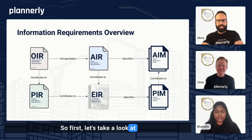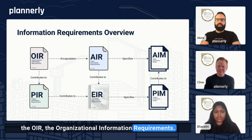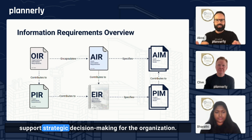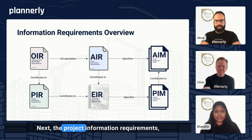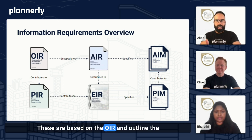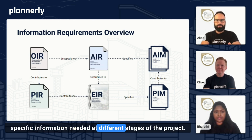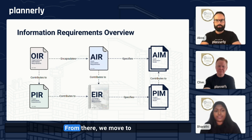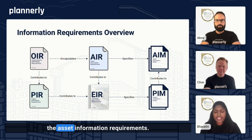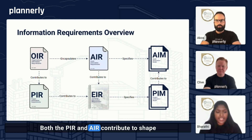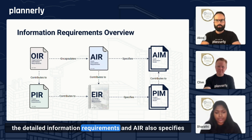Let's take a look at the OIR — the organizational information requirements. These are set by the appointing party and define the high-level information needed to support strategic decision making for the organization. Next, the project information requirements, or PIR, come into play. These are based on the OIR and outline the specific information needed at different stages of the project, making sure the project's operational goals are met. From there, we move to the asset information requirements, which define the data needed to manage and operate the asset over its lifecycle. Both the PIR and AIR contribute to shaping the detailed information requirements.